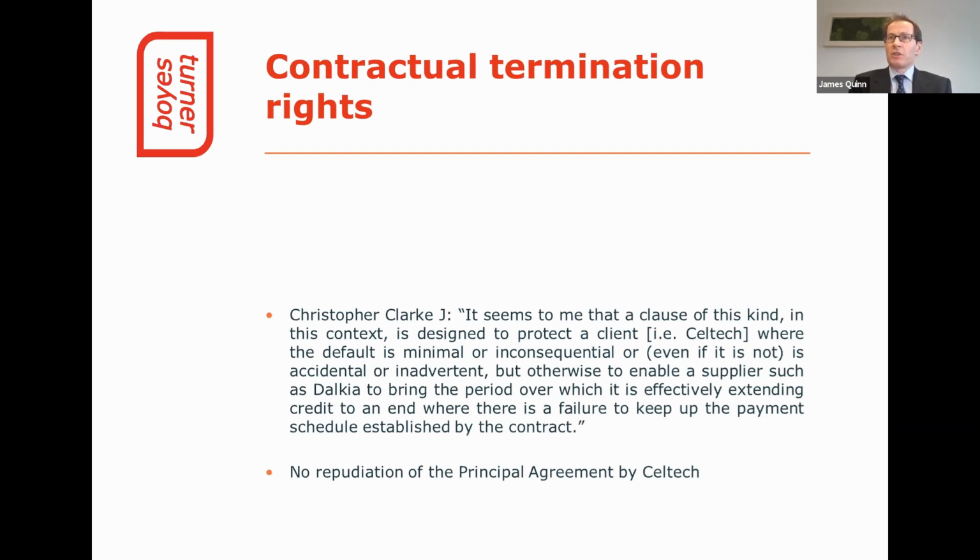It's interesting to note that whilst the judge found that Celtec was in material breach under clause 14.4, it had not repudiated the contract as there had not been a breach of a condition, and that its present inability to pay did not deprive Anglia of substantially the whole of the benefit of the contract. And this is a good example of where an express termination right will come to the benefit of the innocent party, where the same circumstances would not allow that party to rescind the contract at common law.